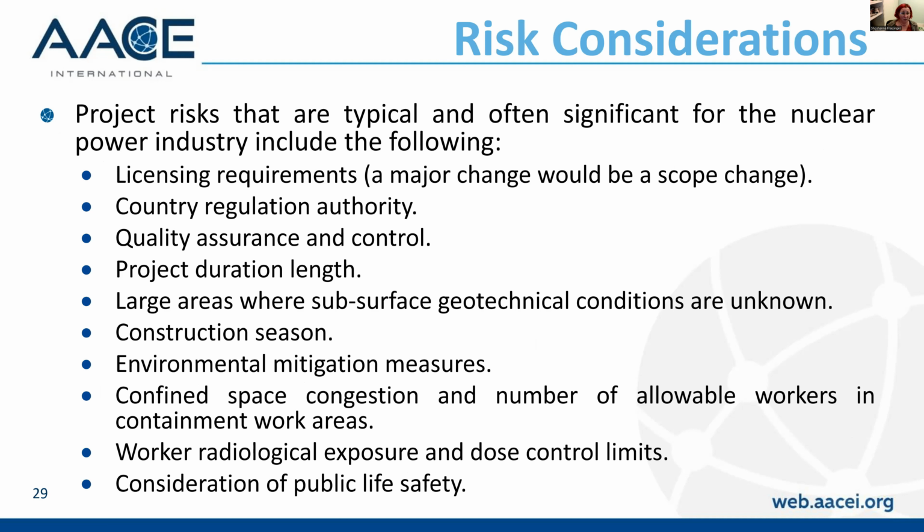Another concern, as I mentioned, in estimates is the potential for organizational pressure for the estimate to achieve a predetermined result, that will ultimately result in a biased estimate. And oftentimes it's optimistic. It's a low number, not a high number. The goal should really be development of an unbiased cost estimate, an objective estimate for both base cost and contingency, so that the project team can take a look at that and understand how to adjust their contracting or execution strategy, and what may be influencing it that they may change.